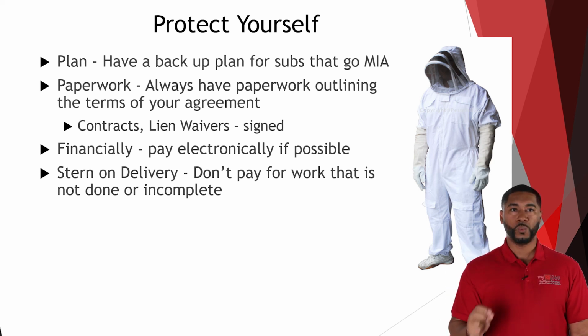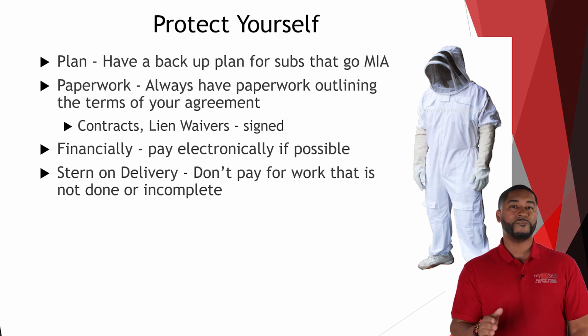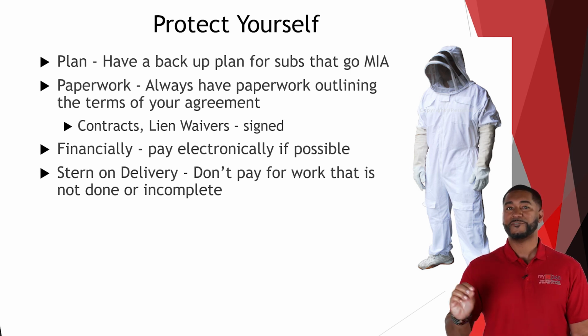Do not pay for work that is incomplete or not done to your satisfaction. Meaning, if your agreement was to pay for the job when it was done, do not pay for the job at the 50% mark. Do not pay for work that you do not feel is done satisfactorily, and give the subcontractor or that trade service the opportunity to come and rectify.